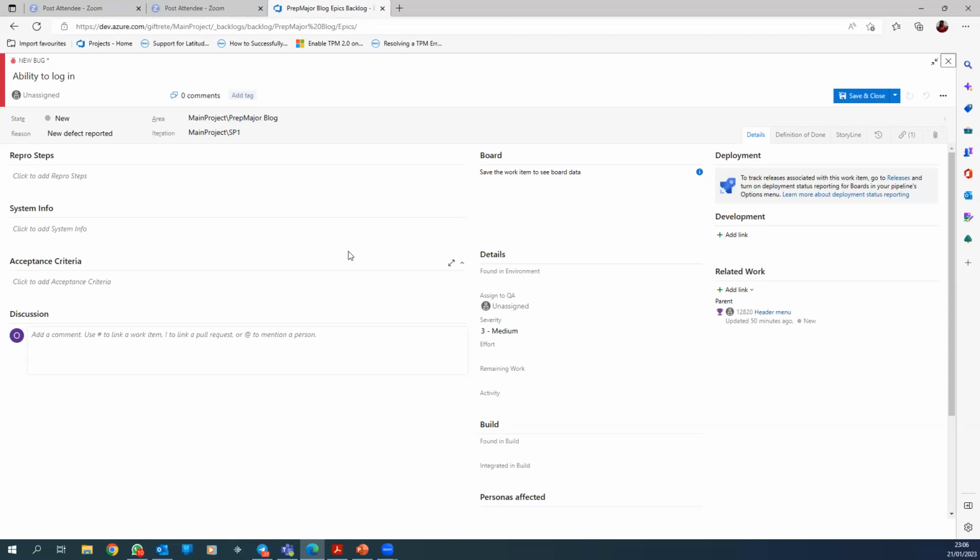So it depends. If you look at another project, what might be a feature on your project might be an epic on another person's project. It all depends on how much work you can do. You just need to be able to break it down to a small enough size to be completed during the sprint. So that's a user story. Does that answer your question? Thank you. Okay, no worries.